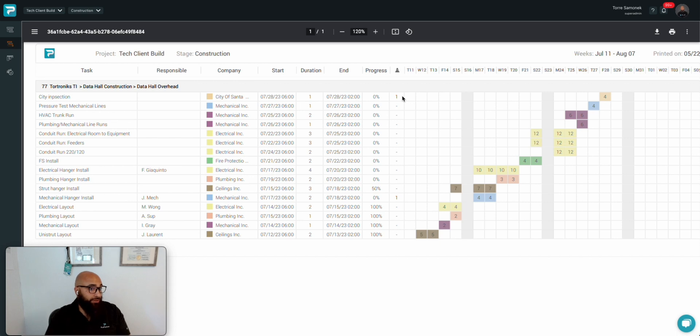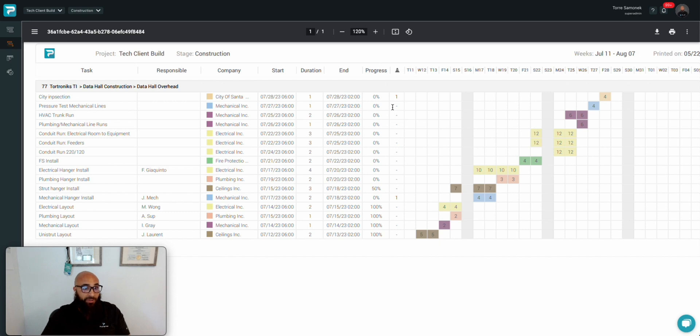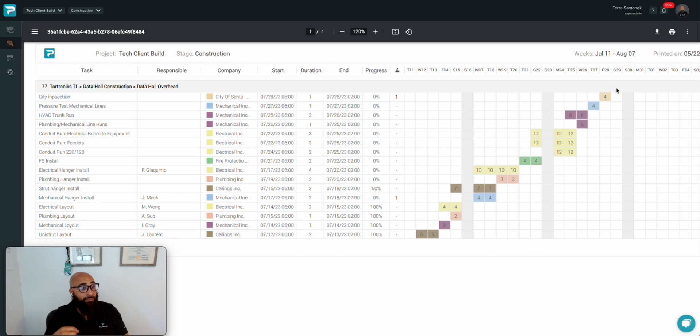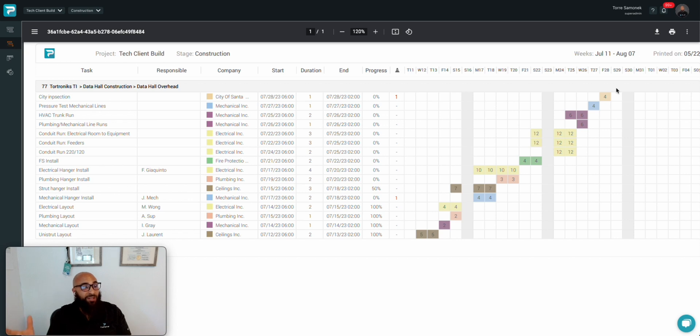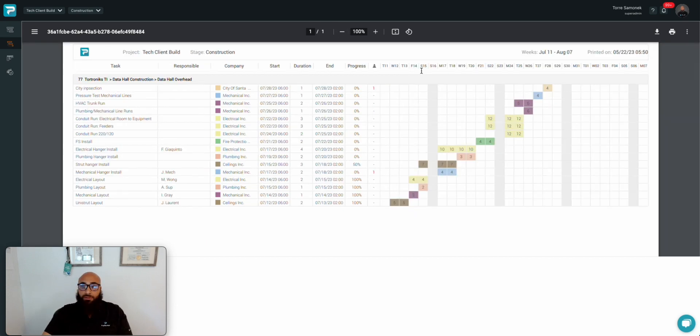So me, as a carpenter, on any project site, can walk right up to a construction trailer, assuming I don't have access to ProPlanner, and I can get a printout like this from the GC team, and I know exactly what I'm working on, I know what company is working on which, I know who's responsible, I know if we have any roadblocks. I see a roadblock with city inspection, and we still have a roadblock with mechanical hanger install. And furthermore, these numbers in these boxes represent the crew size commitment for each of these tasks. This is helping trade partners come up with manpower projections for your project, helping them help you keep a well-staffed project. They can also come up with material needs and even equipment needs. Having a document like this lends itself to conversations around what type of safety training do we need, do we have enough lay-down space for this work that's coming up? And that is how you do a pull plan in ProPlanner. Thank you.